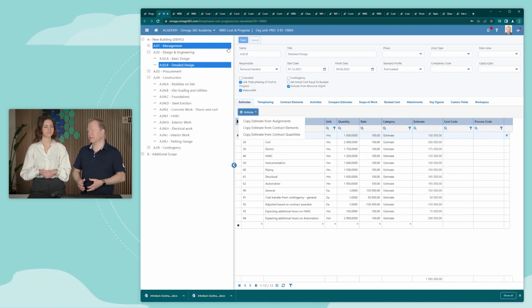The next step is then to set up the work breakdown structure. The work breakdown structure is a hierarchic structure representing the work to be done, and it's essential also to identify the lowest level of the work breakdown structure, typically referred to as a work package. That's where one integrates cost and schedule information.